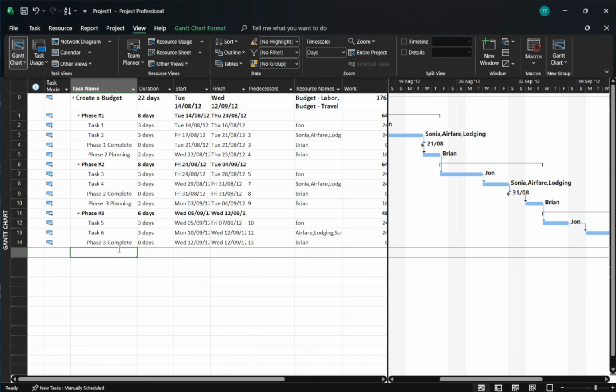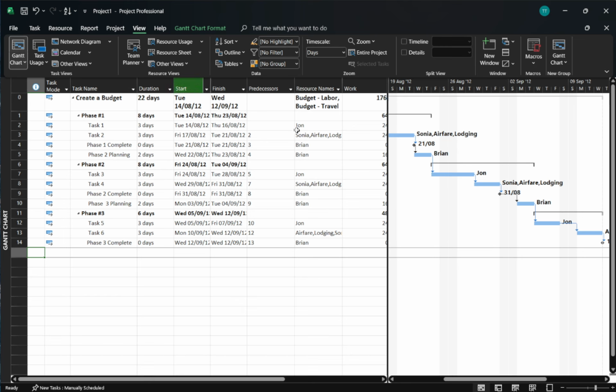They're different from work resources, which represent people who perform tasks, and from cost resources, which capture one-off expenses. Materials don't do work, and they don't drive task duration. They simply represent quantities that get consumed and, when priced, roll up into your project costs.